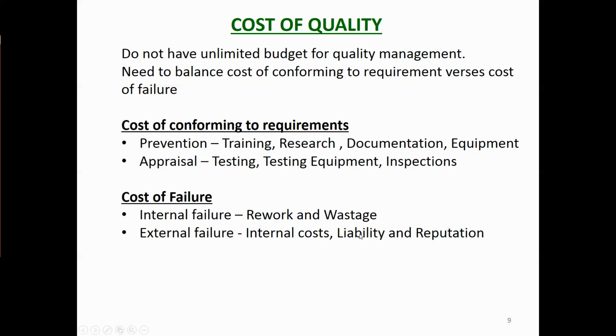So there would be the liability. If you don't build it right, you may run over time and have liquidated damages to the client. And there's your reputation as well. The client looks at that and says, look at these bunnies, they totally mucked up that road, they had to rebuild it, I'm not going to hire them again. So you need to balance those two things, and get a balance where you are achieving your quality objectives at a reasonable price. But you're not going to be able to cover everything off, so you need to keep that in mind.